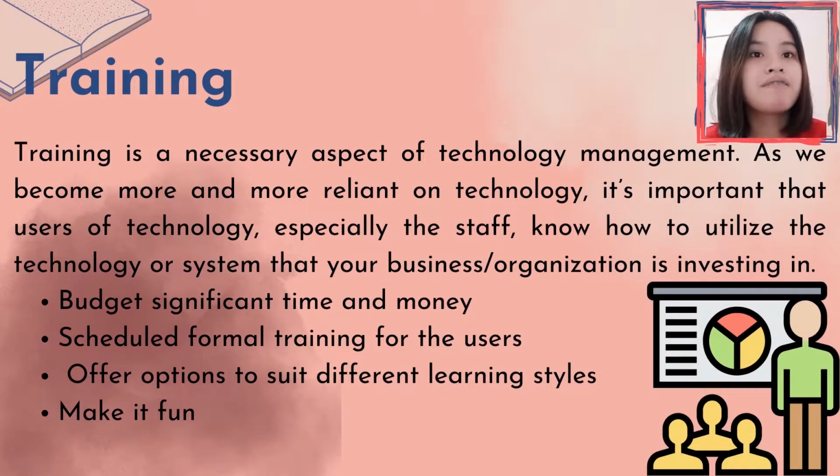It consists of budget, significant time, and money. Training logistics should also be spelled out to accurately budget resources for expenses such as training rooms, training computers and software, and travel for trainers and trainees. Additional resources may be required to overcome systems' shortcomings by teaching users how to deal with the difficulties.